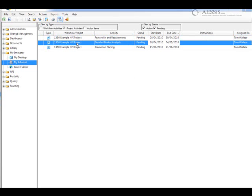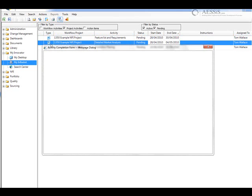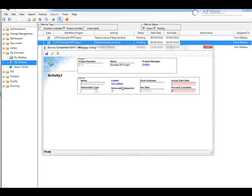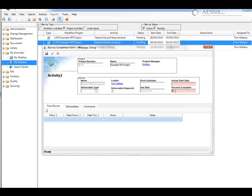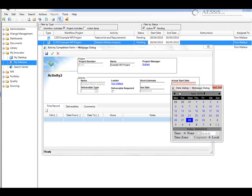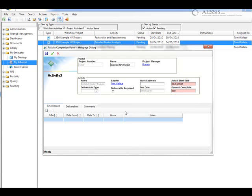So Tom is now going to sign off on one of these tasks. Having done the work and completed one of the tasks, he's going to notify the organization that it's complete. He's going to enter a percentage complete in the box and a date. Now, in many cases, you would also attach a deliverable to the task completion such as a document. In this case, we won't do that here just to keep things simple.